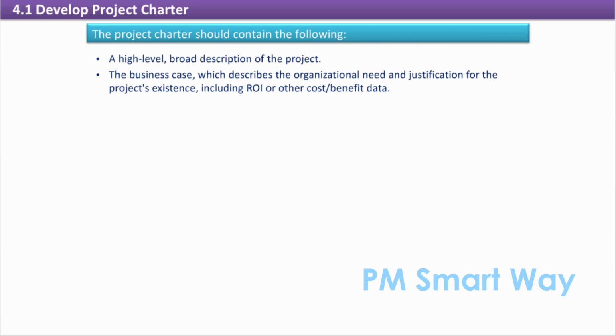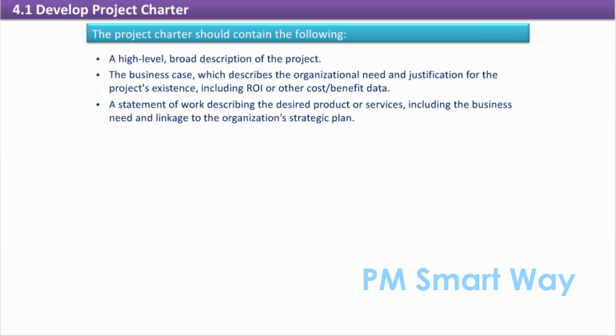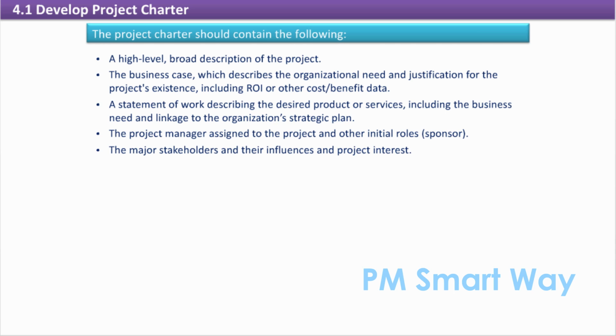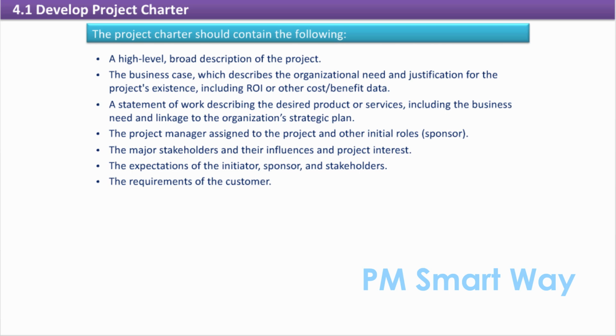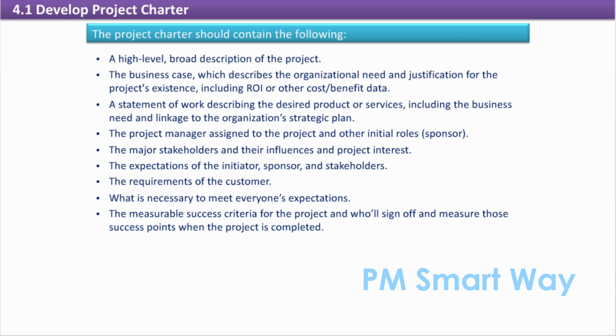the business case, which describes the organizational need and justification for the project's existence, including ROI or other cost-benefit data, a statement of work describing the desired product or services, including the business need and linkage to the organization's strategic plan, the project manager assigned to the project and other initial roles such as sponsor, the major stakeholders and their influences and project interest, the expectations of the initiator, sponsor, and stakeholders,